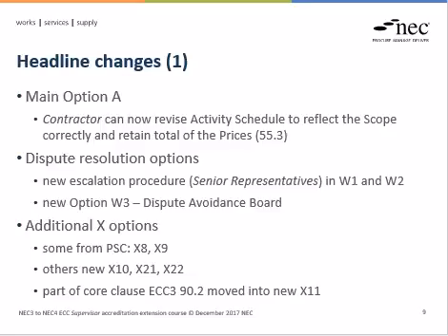There's a new dispute resolution option, option W3, and there's been a new escalation procedure brought into W1 and W2 using senior representatives. Both these are talked about later.